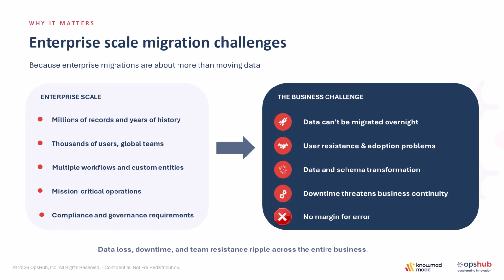Something you have to take into account when you are migrating: you cannot lose the traceability of the information. The challenge is that you cannot do that when you are talking about thousands of users or workflows or information over the night. You cannot do it without taking into account the resistance of the users to the change, which means doing it progressively. Usually it's better than doing it from one day to the other.